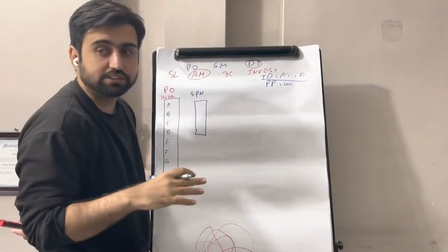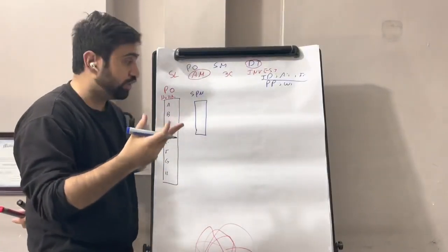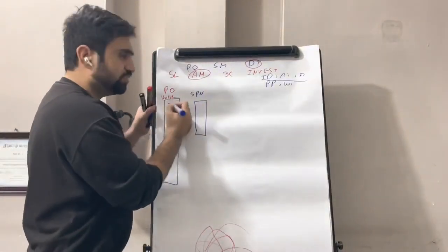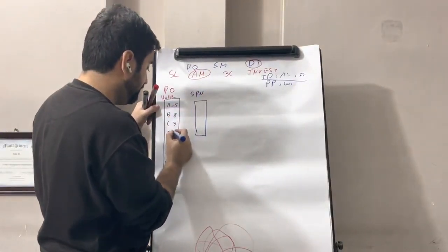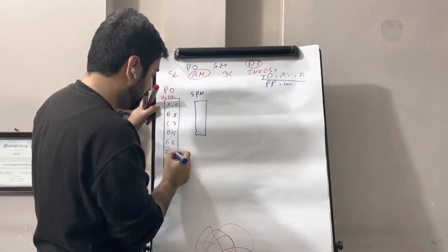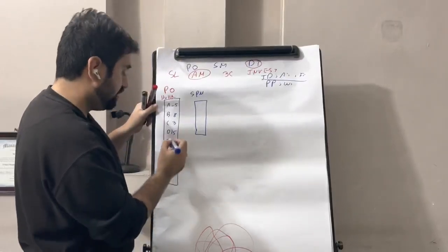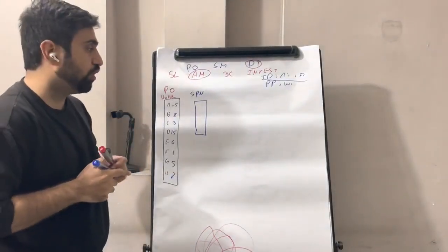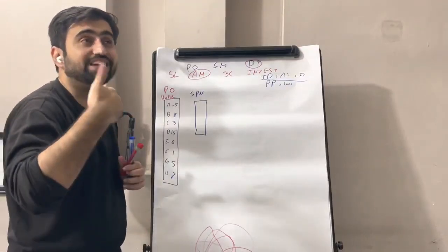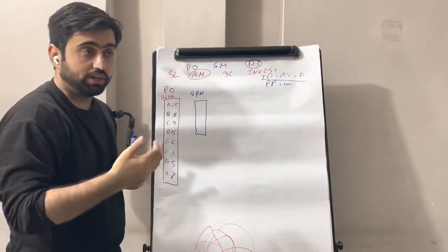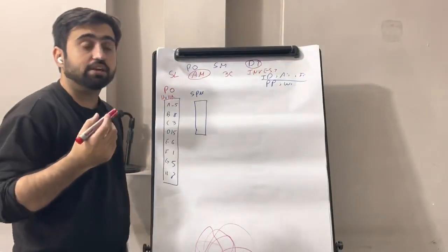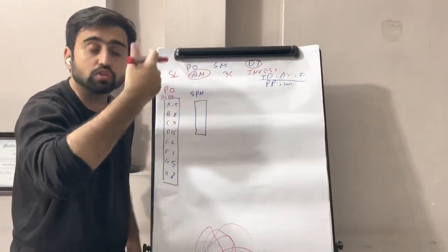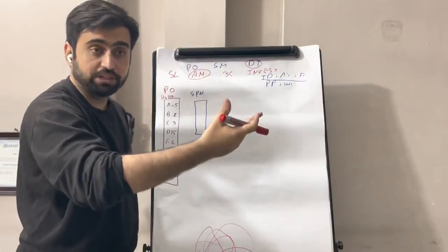Once we have reached consensus on the story points, we put story points on them. I'm just putting a few: 5, 8, 3, 15, 6, 1, 5, 8. Once we have put the story points on them, the team says that we can complete this much work in our first sprint. That is the estimated velocity. Velocity is the number of story points you can do. Story point is the effort required to complete a user story.